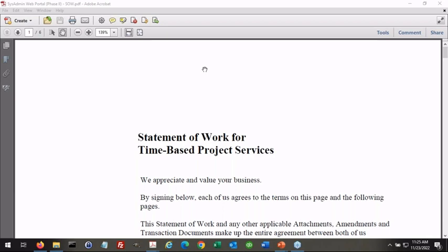I came in and I bid on this because I used an Agile time and materials contract. I knew there would be high levels of change because there's so much uncertainty around this project, and the client didn't have a lot of details. So I expected plenty of change. So what I did was I broke the project down. I gave them a budget.